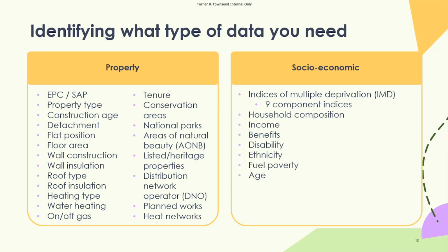And then we've got listed other bits of data that might be useful for retrofit projects. For example, getting in touch with your DNO, knowing which DNO is in your area. This is quite a common one that's come up from those that are delivering 2.1 at the moment, having difficulty getting in touch with their DNO because they're wanting to install air source heat pumps, or perhaps they need a disconnection to a property in order to install EWI. So it's important just to consider that at the very beginning.